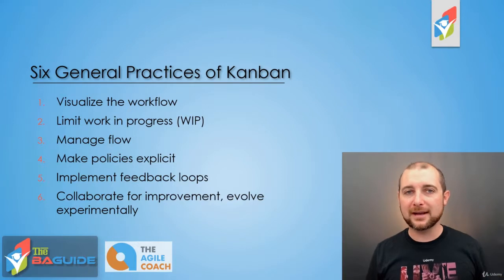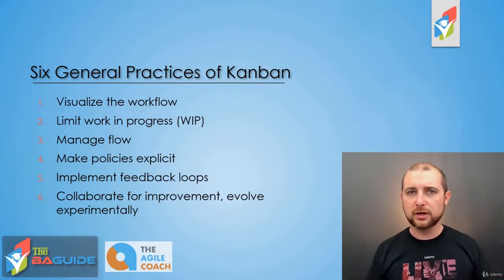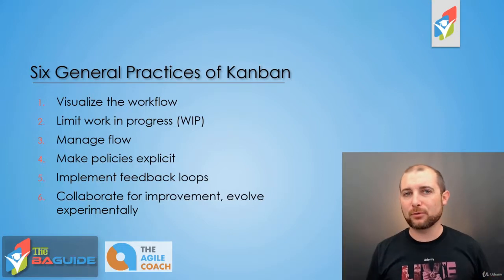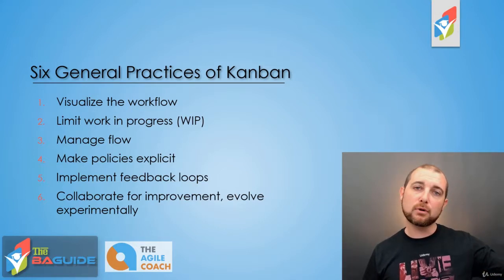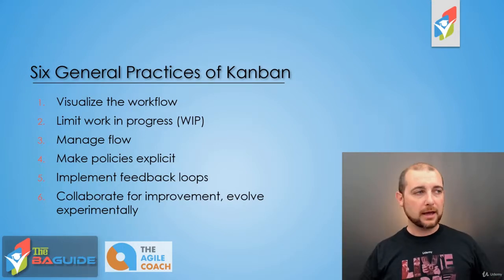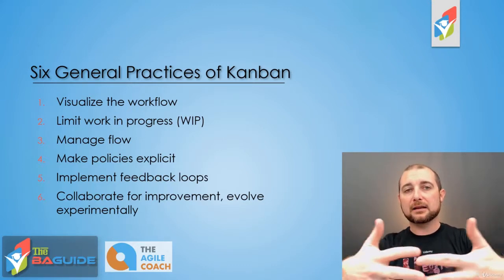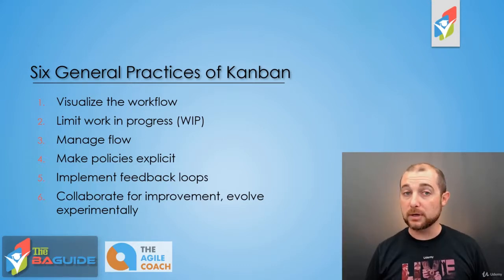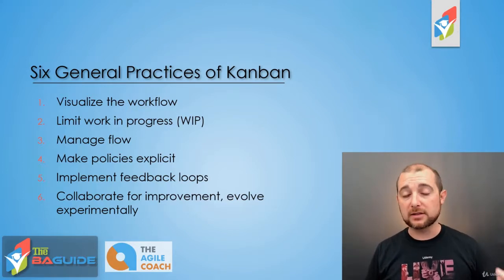Now, the main question I get asked is, well, when do we do this? If we're not doing a time box, a really set structure on a sprint, how do we handle these feedback loops? Well, the easiest way I've seen it done is number one, you still have your daily stand-up. 15 minutes, you're looking at the Kanban board, people are discussing what they're working on, that work in progress, and it really helps to have the full team understand what everybody's doing as you're looking at that visual board and talking to people about what they accomplished yesterday, what they're working on today, and any type of roadblocks or problems they're running into.